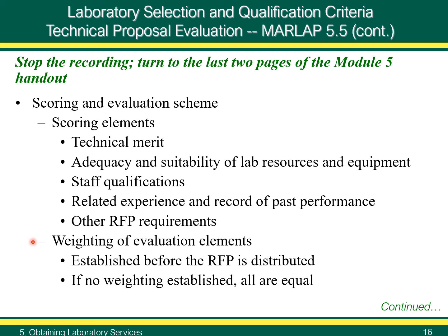The weighting of these evaluation elements should be established before the RFP is distributed. If no weighting is established, all items carry equal weight. Appendix E, Section E.5, Proposal, Evaluation, and Scoring Procedures contains more information on this topic.